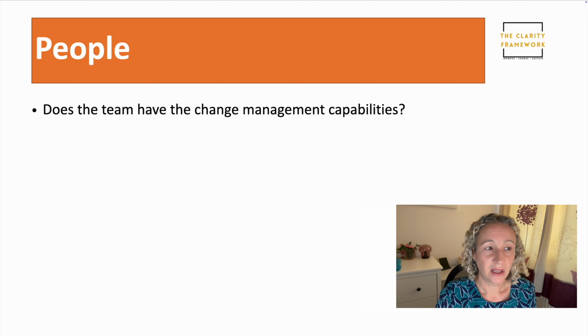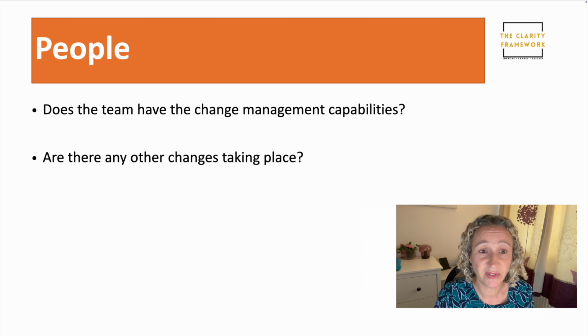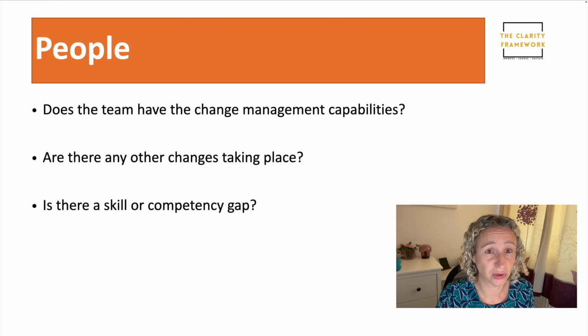Okay. Finally, on people, do the team have change management capabilities? So do they know about change management processes and tools? That's going to help them to plan, execute and deliver the change. Are there any other changes taking place right now that could impact the implementation of this change, or perhaps just cause a bit of change fatigue? Is there a skill or a competency gap if you're, for example, introducing a new ERP system? Do people know how to use that? Do you need to think about training?